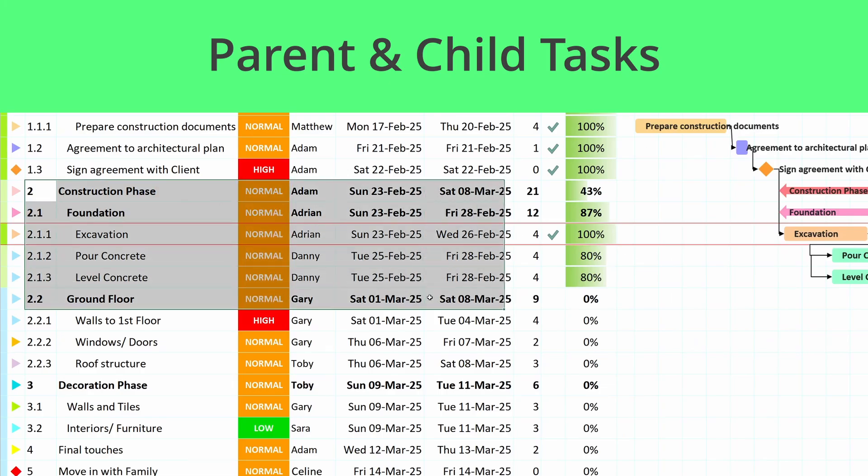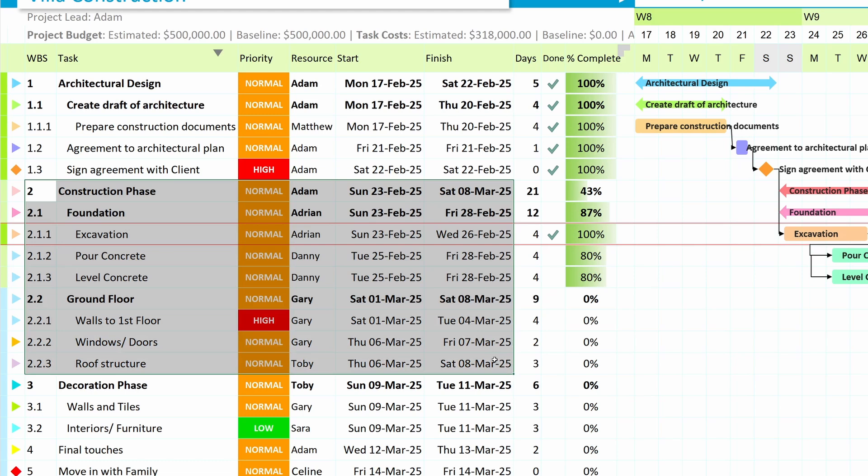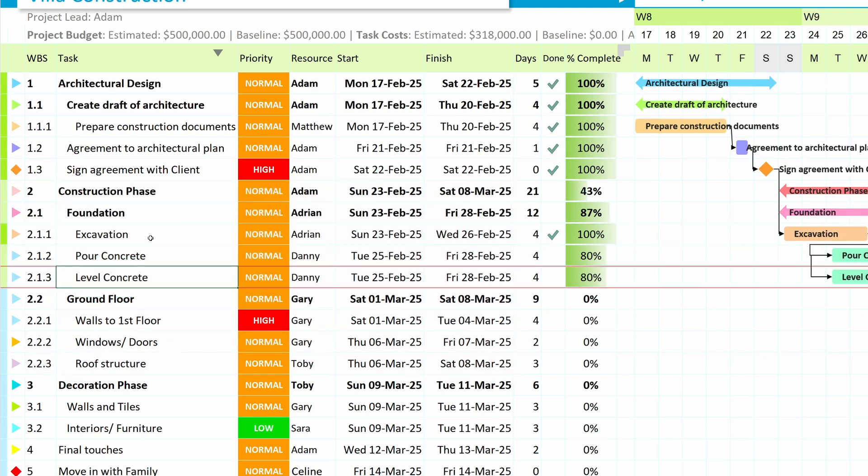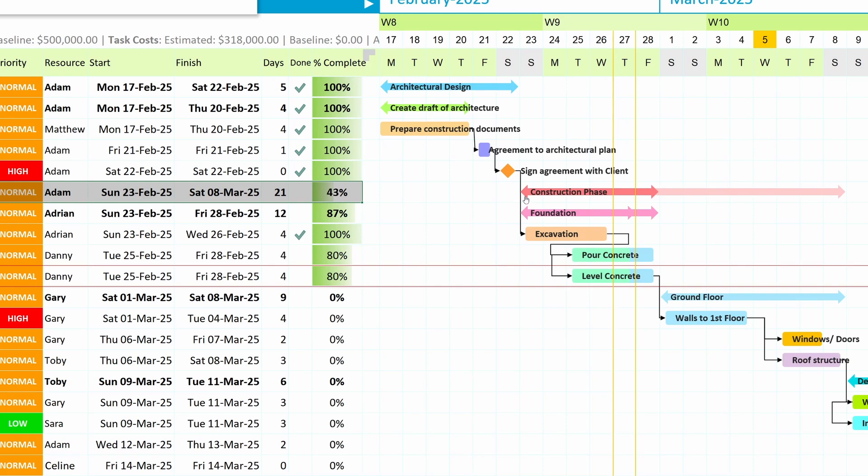Parent and child tasks. Want to organize your tasks better? Set up parent and child tasks to structure your project more efficiently. Parent tasks are automatically bolded and calculate dates based on their child tasks, making them easy to track. Parent tasks also appear distinctly in the timeline for better visibility.